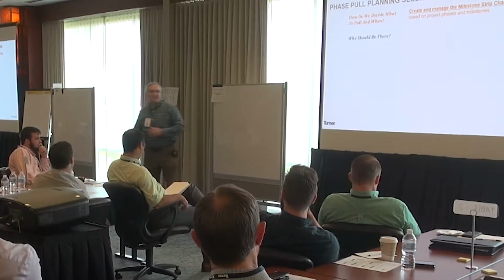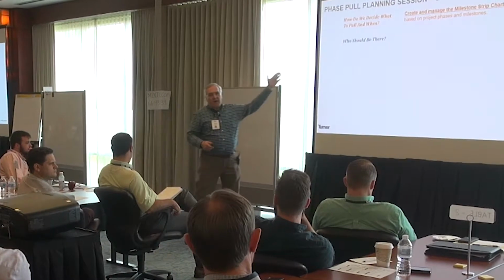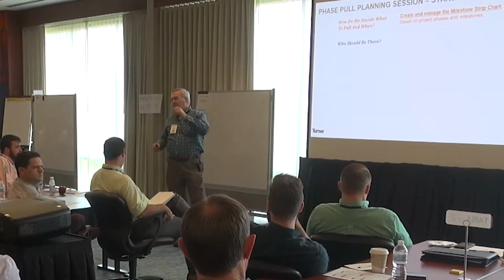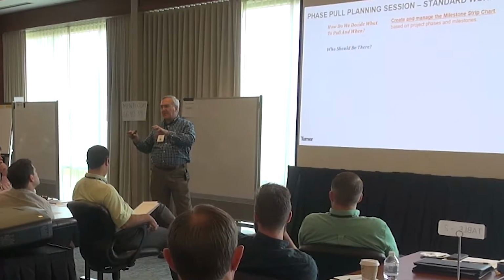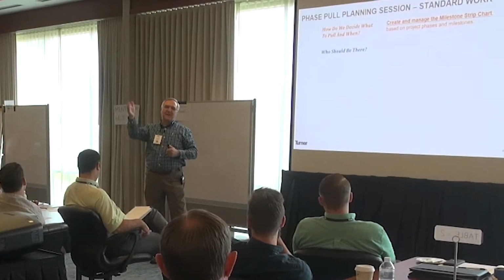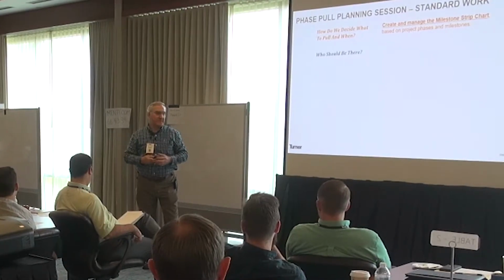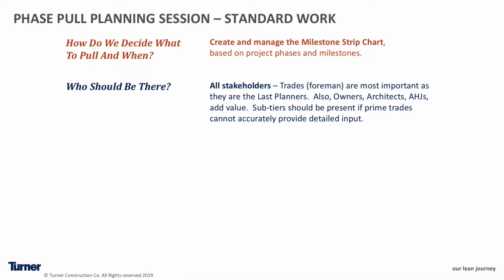So again, our process is you write down the milestone and you write down what's the scope of work that happens in that milestone, and that list helps you invite the right people, okay? So we say all the stakeholders.